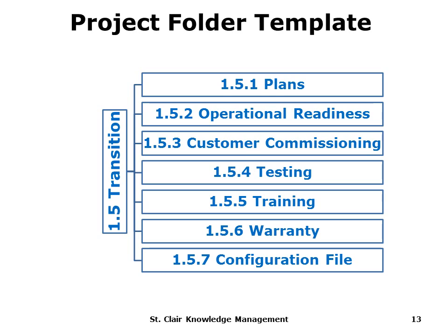So in terms of operational readiness, when would they actually implement your new system? You may say, okay, I want to implement it in, say, 2 weeks' time, and they may well say, well, we haven't got the capacity to do that. It'll be implemented in 4 weeks' time. So that's the negotiation that needs to take place.